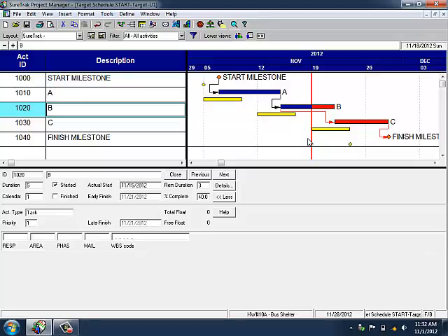The great news on that project is the contractor wanted the 1-month early completion bonus. The contractor originally scheduled the job to complete 1 month ahead of schedule. The contractor finished it to him on time, but to the owner 1 month ahead, and they paid them $2.1 million early completion bonus, $70,000 a day for 30 calendar days. That's what it's all about. In a capitalistic entrepreneurial society, that was a success.